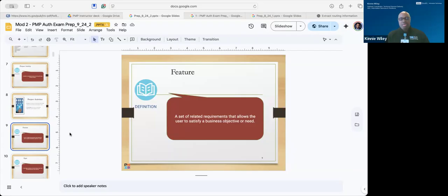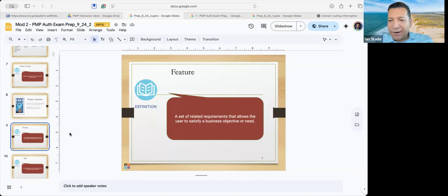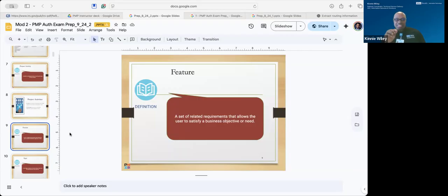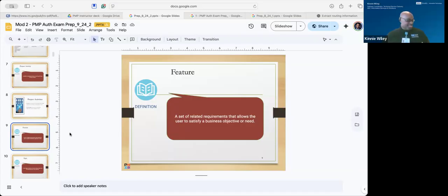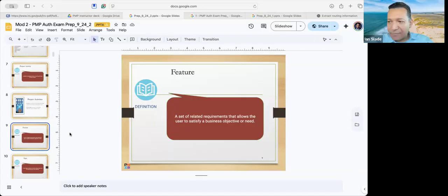Okay. So the activities could include get brake pads from the warehouse, bring brake pads back, attach screws to the brake pad, attach brake pad to the rotor, things like that. So what is attaching the brake pad to the rotor? Those are the step by step. So that would be an activity, because those are the step by steps underneath it.